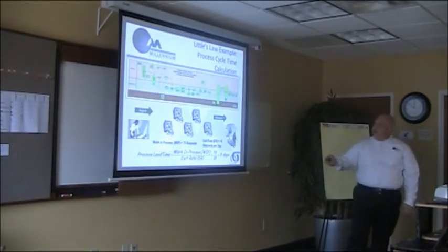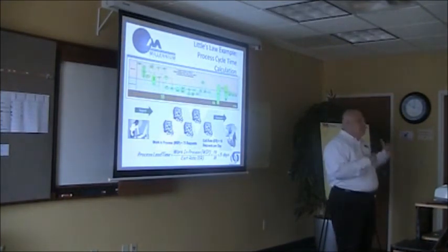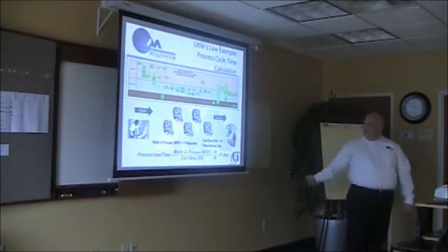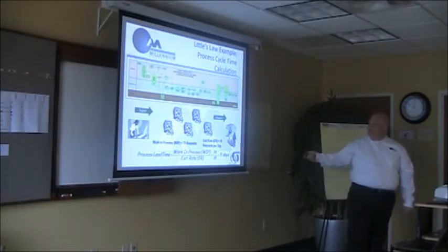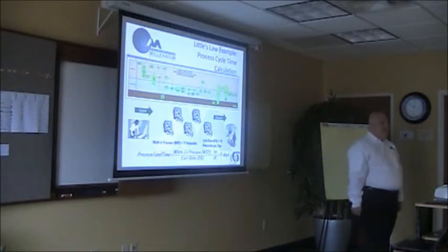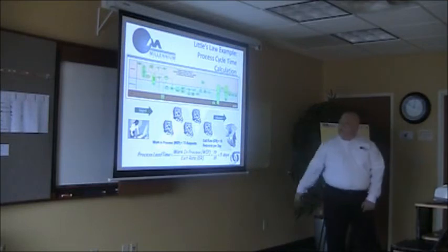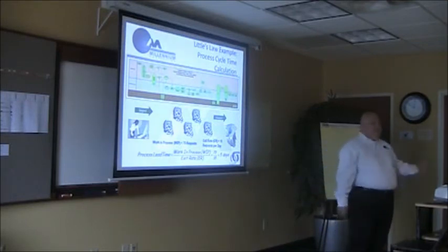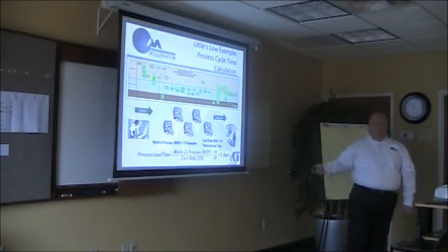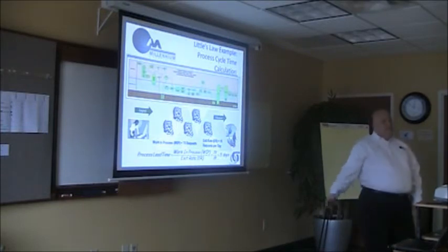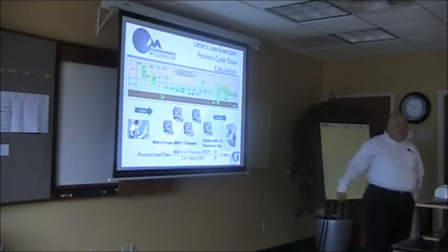Little's Law, this is talking about how fast can we respond to changes. So if we've got 75 requests in process and we can get out 15 per day, then what this says is it takes us 5 days to respond to changes in the process. Now this is a snapshot in time. Some days are a little faster, some days are a little slower, but we get out about 15 per day. So how fast can we respond?